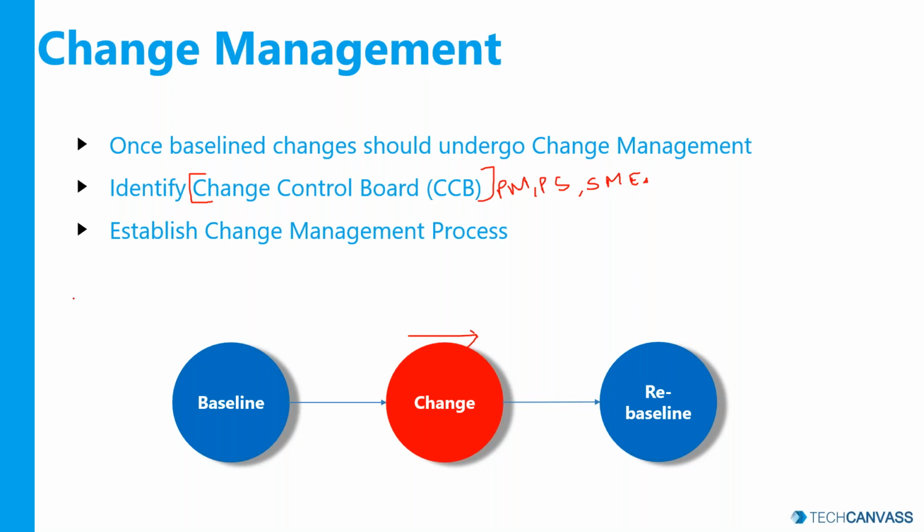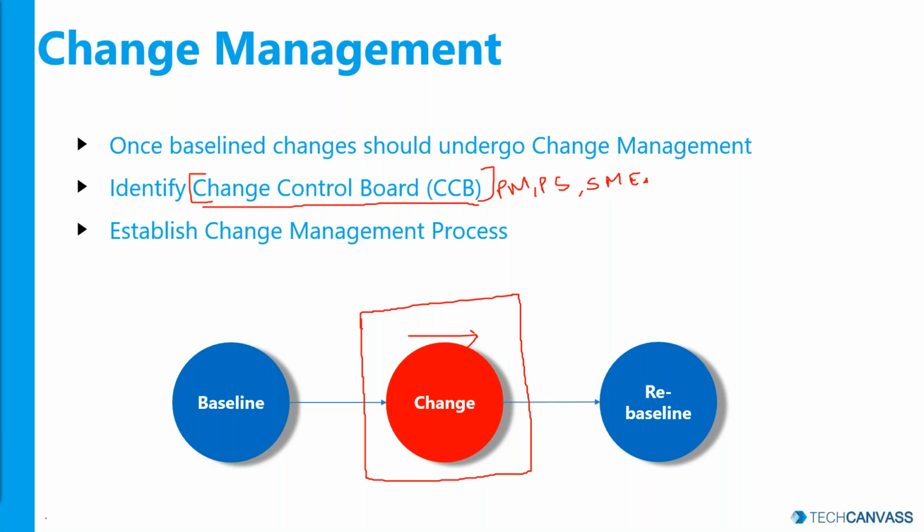Now if I go back to Dell's question, let me answer it pinpoint. If the project milestones change more than once, should the project manager keep the high power? Yeah, so in terms of communication, yes, but the priority for the project manager, if the schedule is getting changed after baseline as you have mentioned, is that before he even applies the new schedule, he needs to make sure that it undergoes the change management process. The change control board will review the proposed new schedule and what its impact is on the cost and the scope.